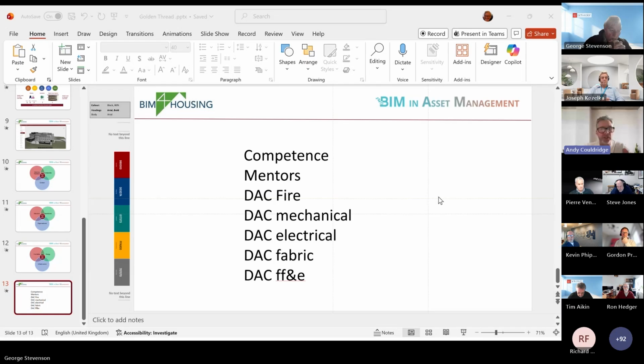In the absence of digital data that tells you what you've got, particularly on older buildings, it gives you something to give to the contractor. Yes, I agree that it might be part of a wider access control system, BMS system, or otherwise, but it gives you something to take to a supplier so that they arrive with the right parts. The value is that they arrive with the parts in one visit and not two, rather than needing to look at it first to see what to order, go away and come back.